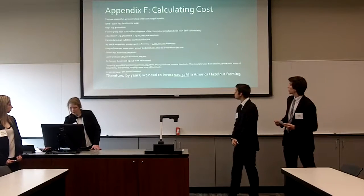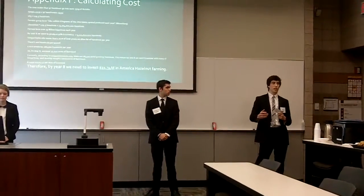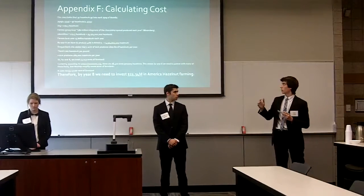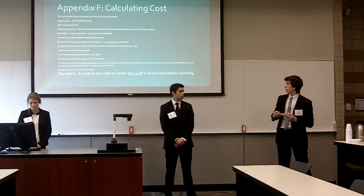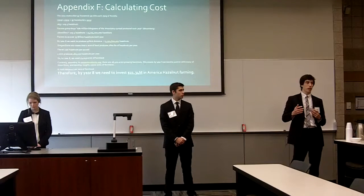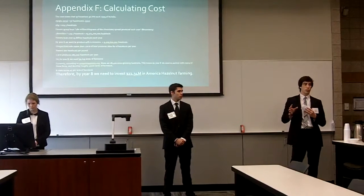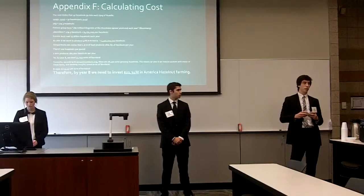Can we go to, yeah, I think it's that one. So right now, 99% of hazelnut production is in Oregon. And we figured out right now, we would need, I think, 23.2 billion hazelnuts. And if by year 8 we want like 40% of that to be in America, that's 9.3 billion hazelnuts. So that means that we would need 33,000 acres of farmland in Oregon. And currently there's already 28,400 hazelnut farming acres between 650 different farms. So we decided if we're partnering with Willamette Farms, and if we partner with a few of the other farms, we'll probably need to develop about 10,000 acres of farmland, which is definitely doable in 8 years.